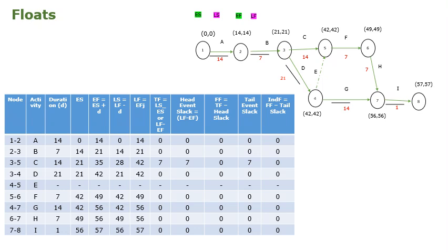Next, we will see how to calculate the float. It is a sample calculation given here. For this particular sum, the float value is not widely spread. So for example, you can take the formulas and calculation steps. This is the network we carried over from the previous slide, and the total float can be calculated from the formula: the difference of late start minus early start, or late finish minus early finish.